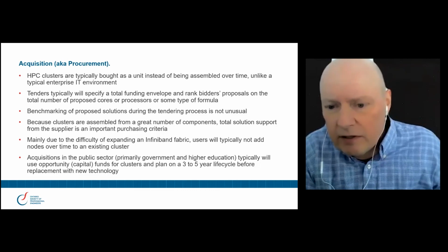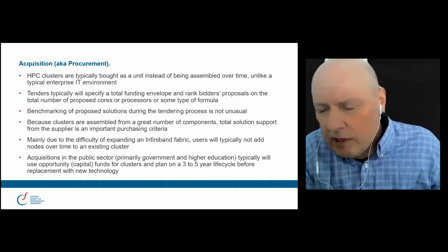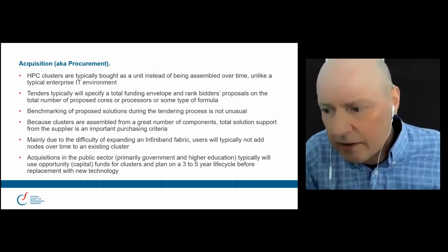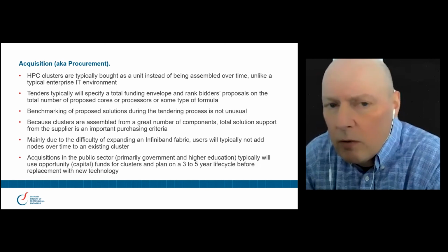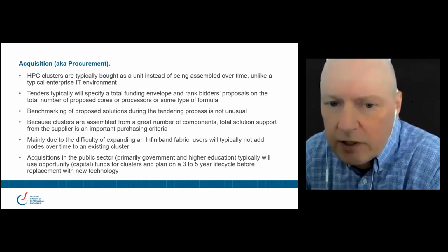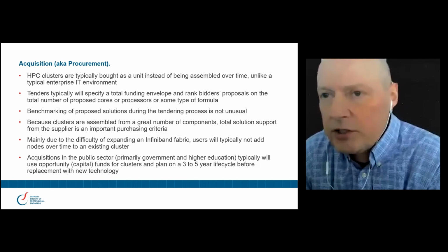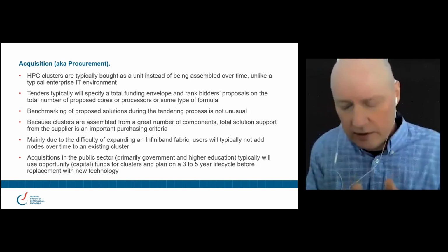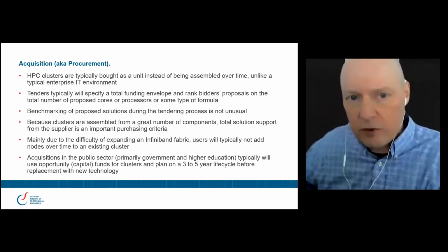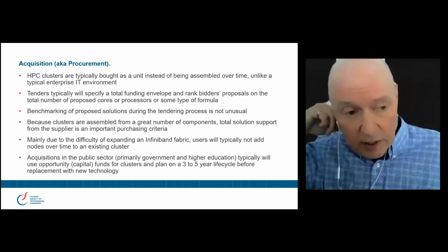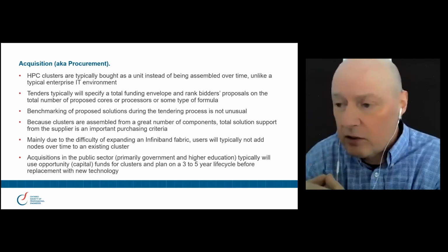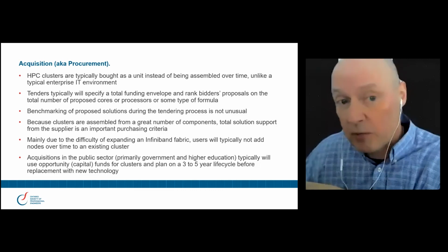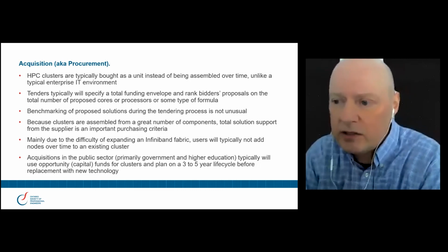And the reason for that, as I say farther down the slide, is because of InfiniBand, which is a total bear to do upgrades on. So what happens is there will be a point-in-time procurement exercise to purchase a cluster, and the latest technology will be purchased in that exercise. Then at some point in the future, when there needs to be more capacity, there's typically a new acquisition cycle for the latest technology at that point in time, and you get a separate cluster. So that's typically how these things work.